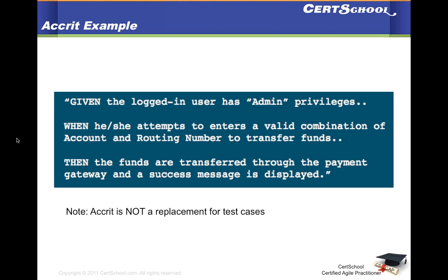There are concepts like story swapping or punting stories or scope creep. All these things come into the picture, and I'll be taking these as flashcards. In a simple scenario where you haven't started working on a committed story in a sprint, and there's another story which your product owner wishes to complete to satisfy one of our customers as a part of that sprint, and it has an almost equal estimate, you can swap that story with the new one. Not very easy to do always, but that is one of the easiest ways of looking at it.